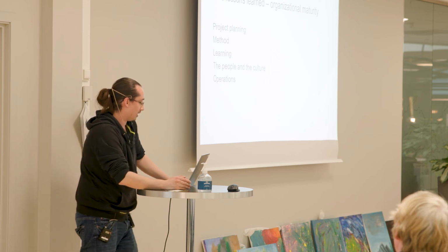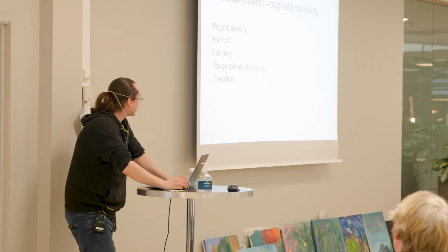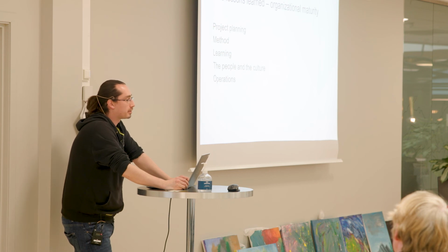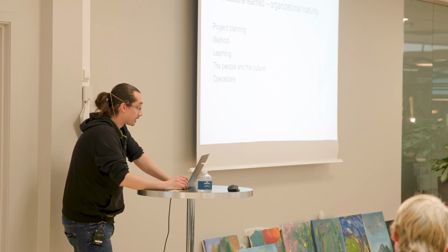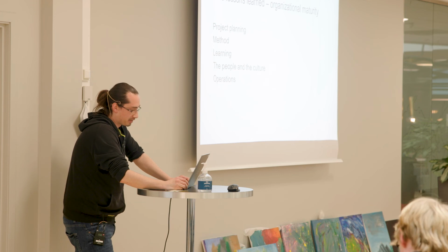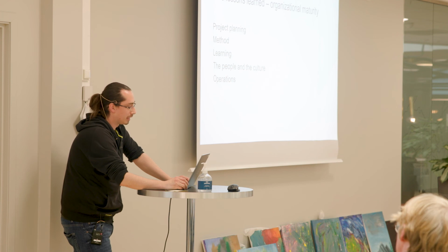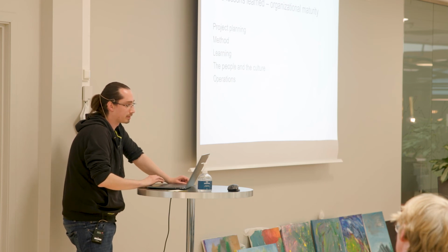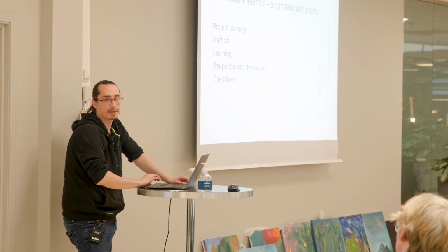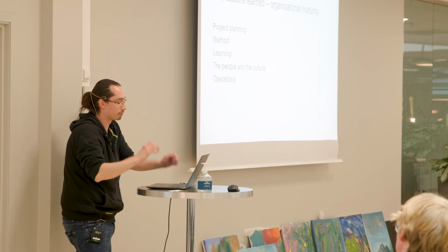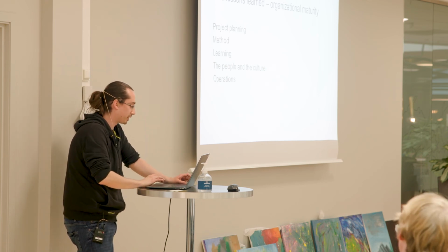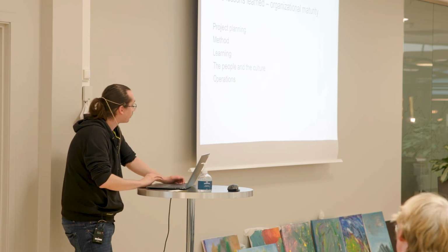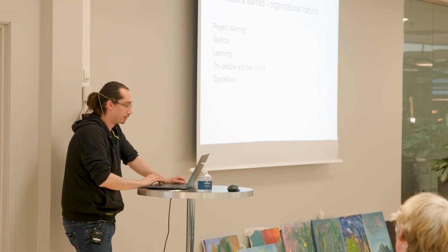At a certain point in time, this will be put into production and in the realm of operations. Now I do operations as well, so I am that same person. So if I mess up, it's my own fault. But obviously, you don't have a 100% overlap, and being able to do a neat and tidy and timely handover is extremely important. And we did not really have time for that. So the follow-up period has more or less just been an extension of the project itself, which isn't all that fortunate, because this is something that everyone should learn because it's part of our systems portfolio.